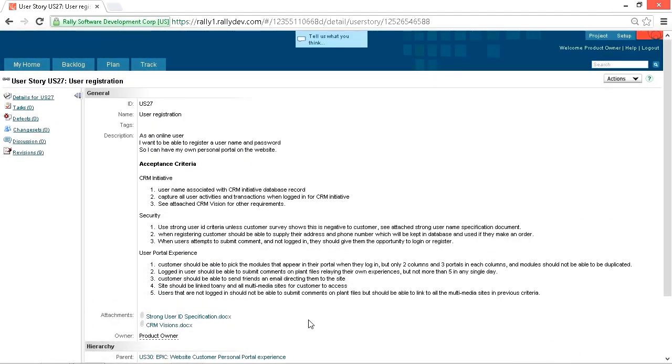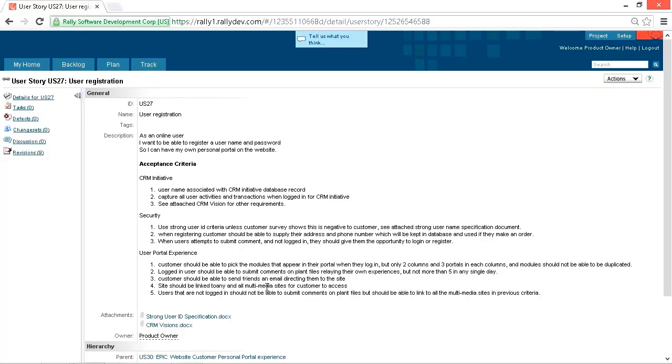If an estimate for a user story is large, there normally isn't enough detail or too many unknowns to provide a good estimate. In this case, there's just too much user story. These types of user stories are considered epics, and they should be split into several user stories that are small enough to understand and estimate. The team will provide more accurate estimates for smaller user stories.